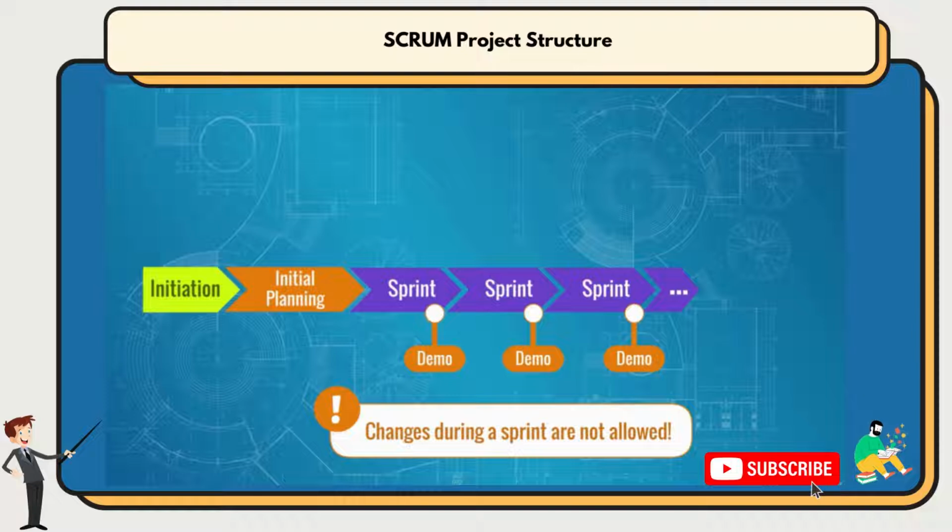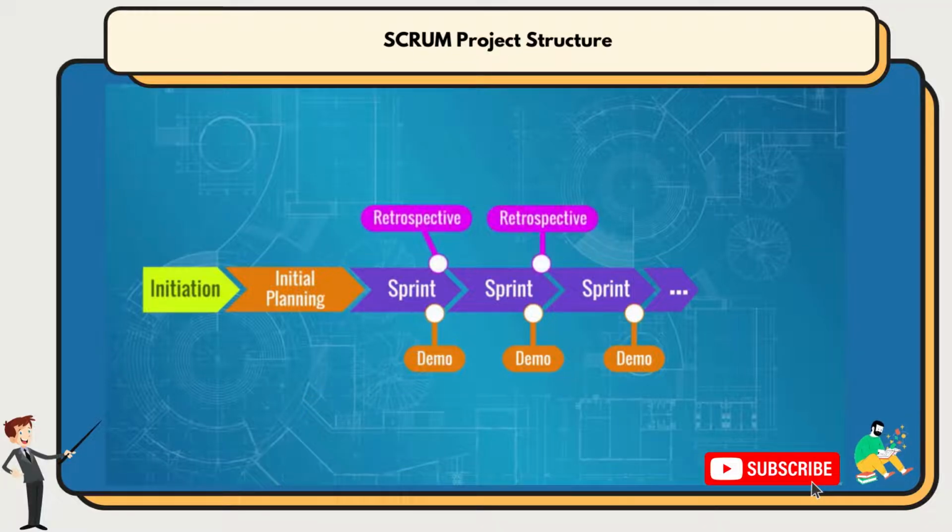Before moving to the next sprint, the project team holds a brief session to discuss the lessons learned from a previous sprint. It's called a retrospective, or retro. In this way, the team can immediately catch issues in their way of working and implement the improvements as of the very next sprint, instead of collecting lessons learned only at the end of the project and applying them to the next project. We explained that a certain amount of planning takes place before the sprints start.